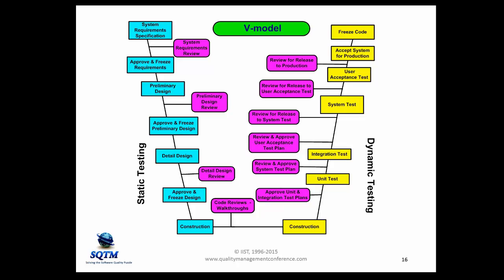While they're going through it, they do inspections, they do reviews, they record defects, they show that they've been corrected, and again, at the preliminary design review, or you can just have one design review, whatever your organization does, quality assurance comes in, does the audit, makes sure that everything is ready to go, and writes the report, sends it to the approving authorities. They sign off, and it's approved, frozen, and goes into the control library. So the process continues in this way throughout the life cycle.